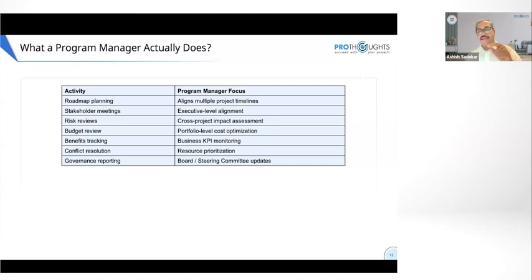In project management, they introduced some 5 years back a fifth strategy called escalate, but many people didn't understand what escalate is. Escalate means that because the risk is affecting multiple projects, or the event of the risk is there at multiple projects, the risk should be taken by the program manager and should not be handled at the project management level.